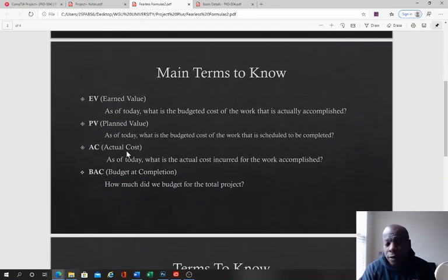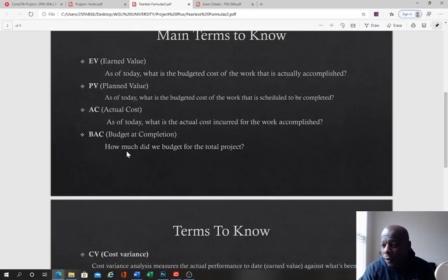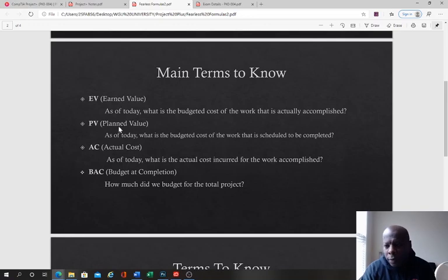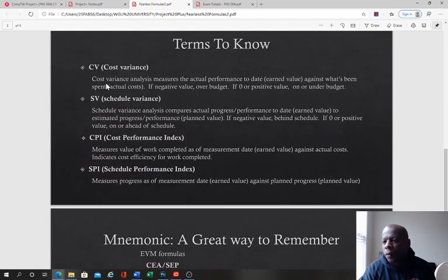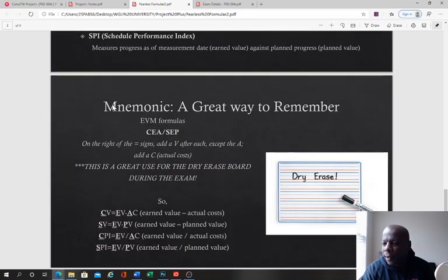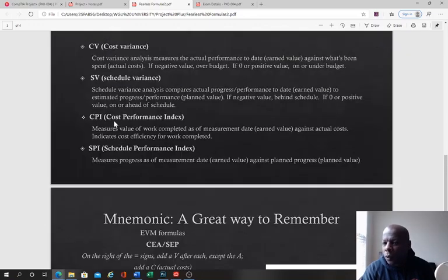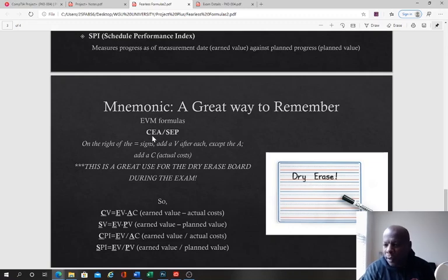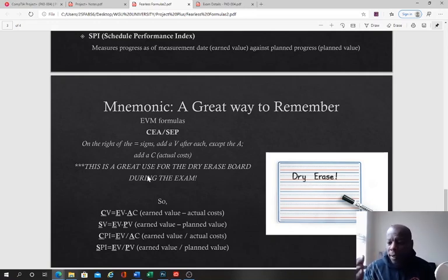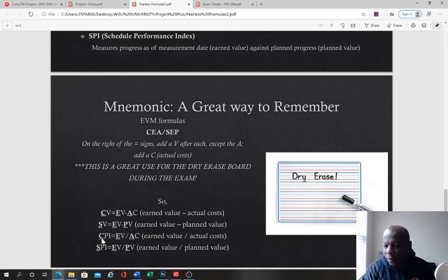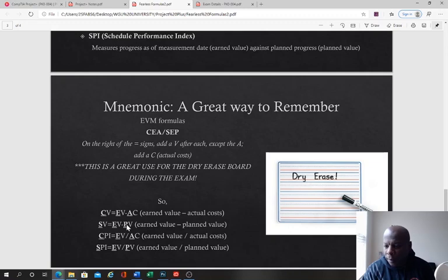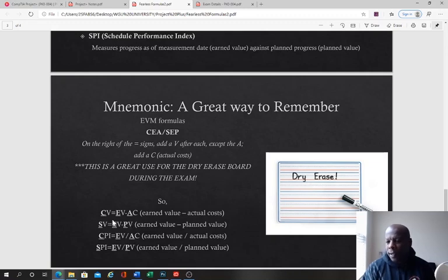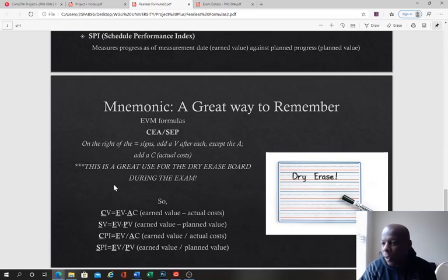Now, the fearless formula. You're definitely going to need to know this. You need to know the earned value, the planned value, actual cost, and then the formula itself. Because how they break it down when you go with the cost variance, schedule variance, cost performance index, schedule performance index. So you have this mnemonic device, and this can help you - CEA, SEP. This didn't do anything for me, I will tell you. But what I did, what made sense in my mind when I looked at it, I said hey, it's only two of these have two letters, and two of them have three letters. So I can put those in order, and then when you do the formula, CV equals, everything is earned value. Every single one of these is earned value. And then two of them are minus, and AC's at the top, PV's at the bottom, that's a minus. And then two of them are divide, AC and PV. So AC and PV on both, and then that's how I kind of got it to soak into my mind until I was comfortable with the formula.